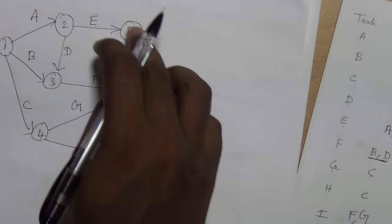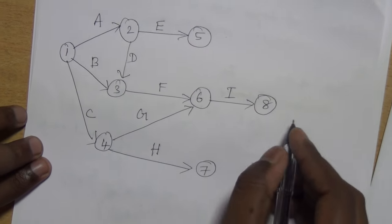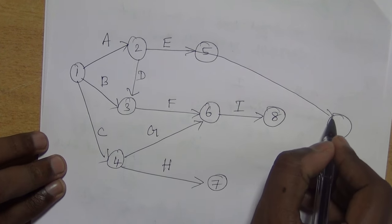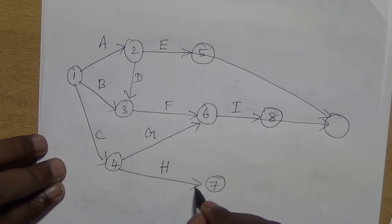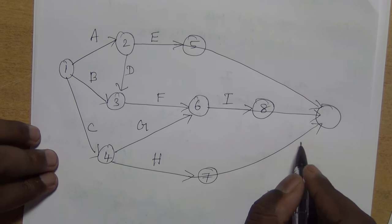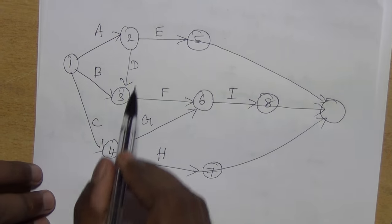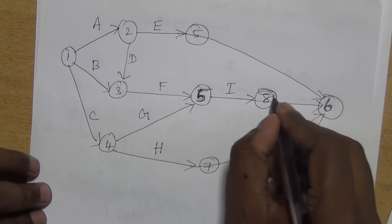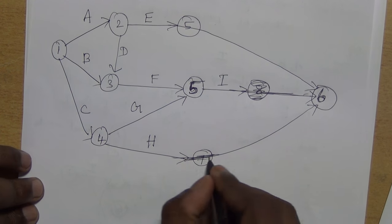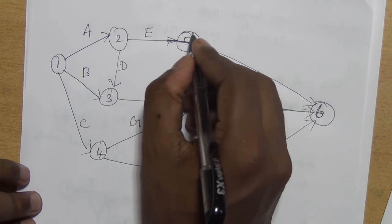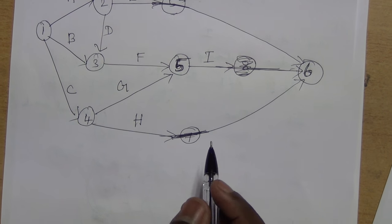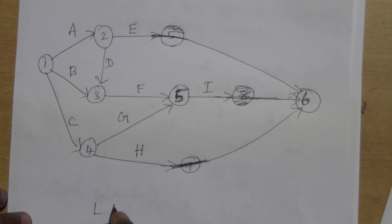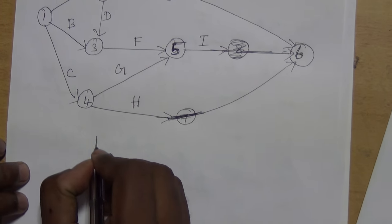Three end states have been completed. Instead of keeping three separate ending states we can have one single end state and connect directly to it. So we can eliminate those three states. We have nodes 1, 2, 3, 4, 5, and 6. These extra states are eliminated because they connect to the ending state. We have constructed our network graph. The next step is to calculate latest completion time and earliest start time for every node.